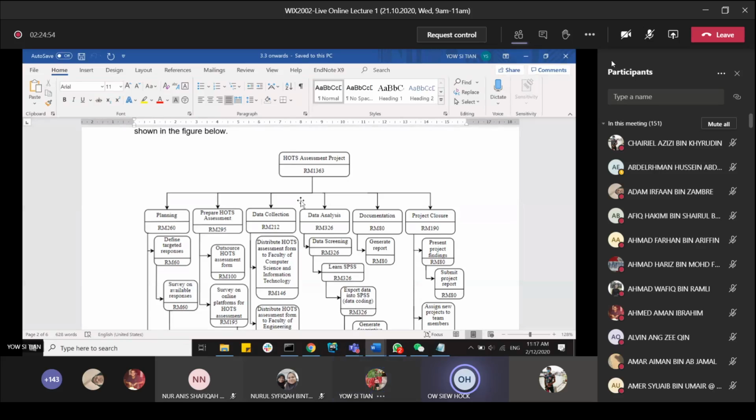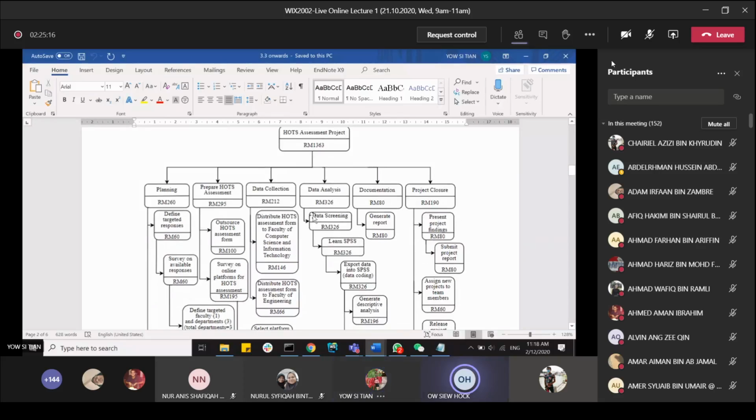So your project is over cost because of the risk that you are not able to estimate the cost correctly. So that means later after I change this, I also need to put the underestimation under the risk management, is it? Yes, you underestimated. That means your risk event is due to inexperience in cost estimation, you underestimated the cost. And because you underestimated the cost, the consequence is your project ends up with over cost. Now you can see how the whole thing is related.